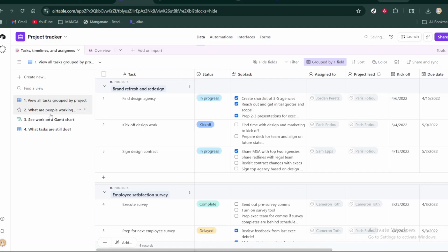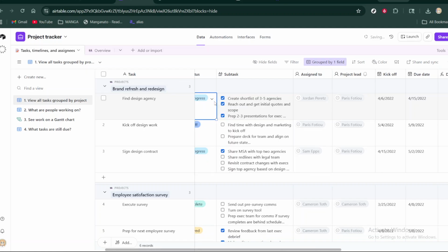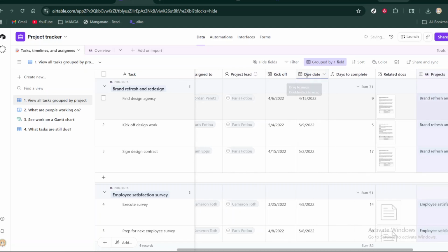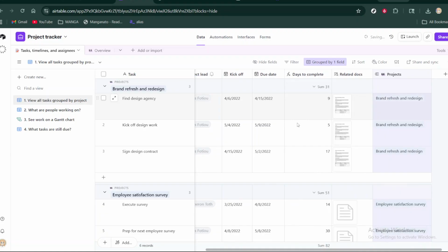With your structure in place, start creating tasks. Each row is a task. Give it a clear title, pick a status, set a priority, add a due date, and assign it to a team member. The collaborator field is helpful for assignments, and you can add notes to provide context or requirements so nothing gets lost.